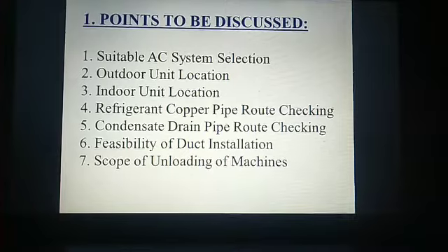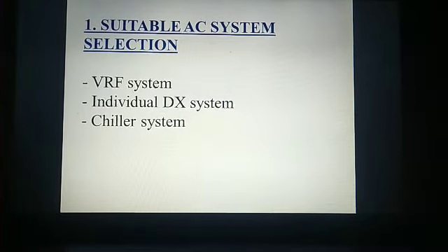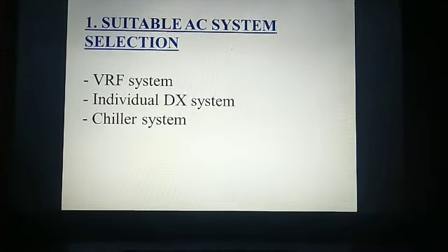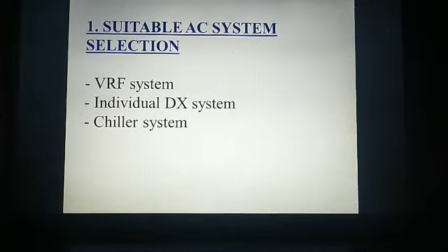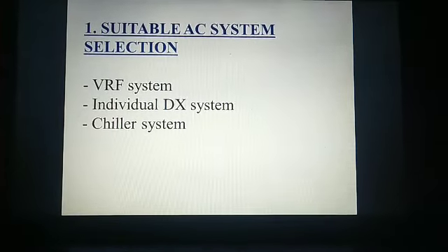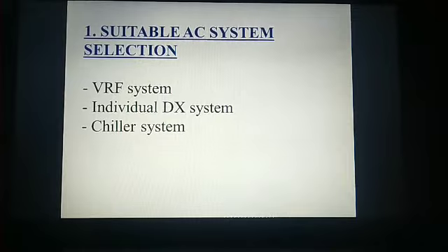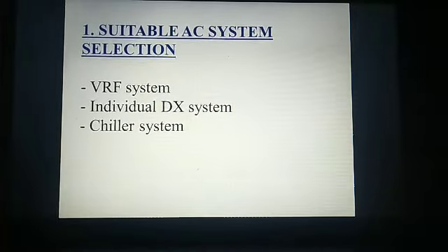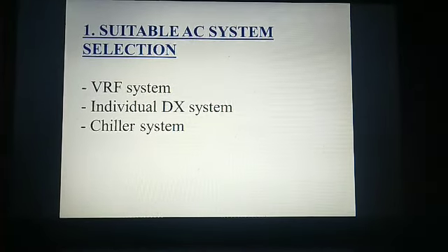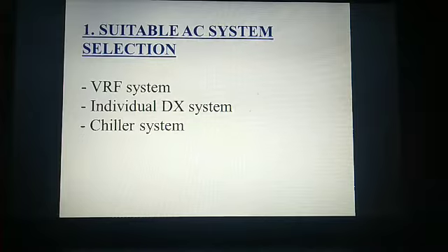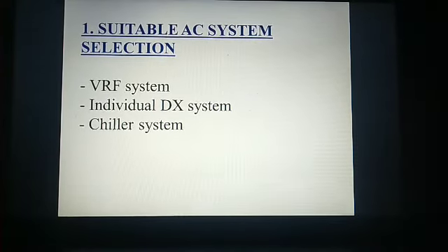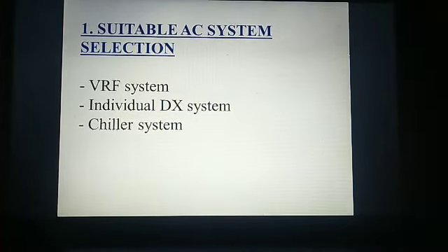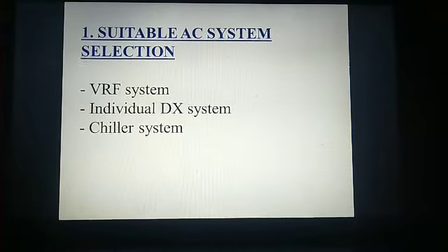First point is suitable AC system selection. If you are visiting a site for the first time and drawing is not finalized yet, then decide the system first. System means VRF system or individual DX system or chiller system. Out of these systems, you will have to determine which system is suitable for client in terms of budget and installation. Then suggest proper system to client accordingly.